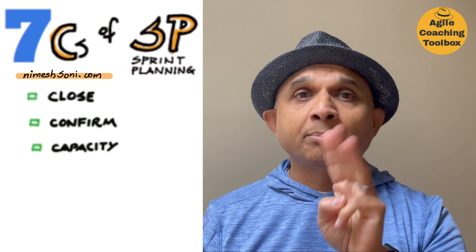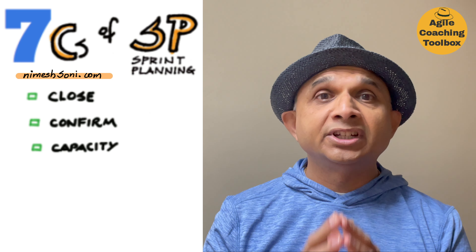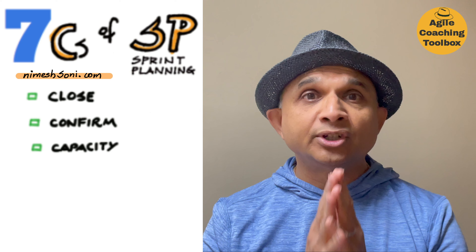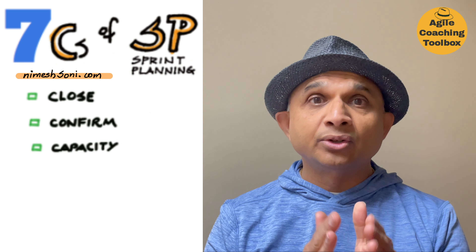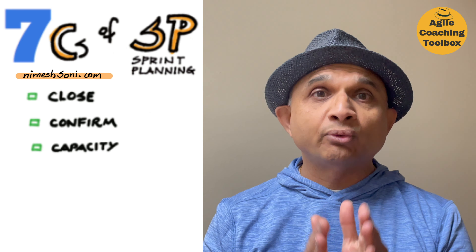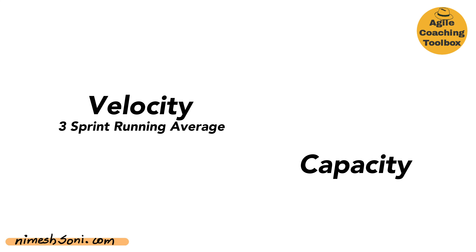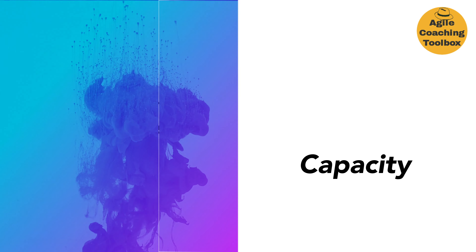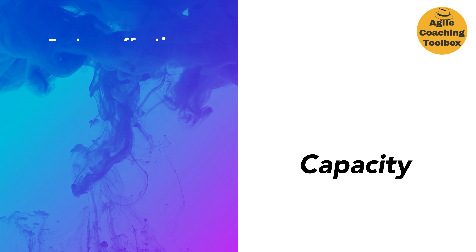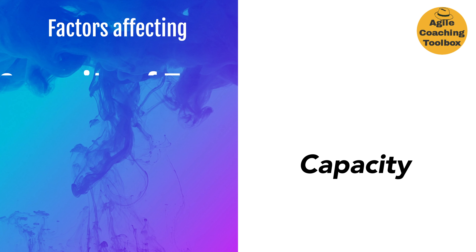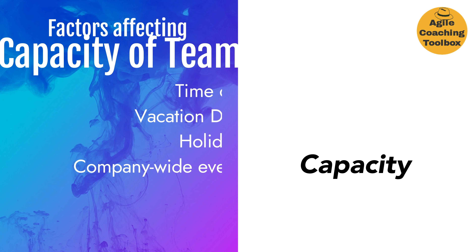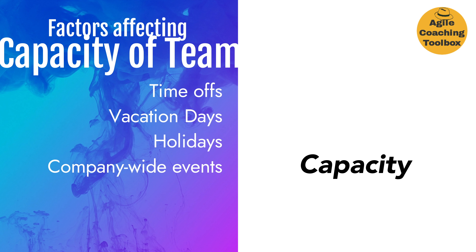Number three is capacity — referring to the capacity of the team. How many stories can you take into the sprint? How many stories should we load into the sprint backlog? To answer this question, you will need to know the velocity of the team and the capacity of the team for this sprint. In order to find out the capacity of your team for this coming sprint, you have to ask them. You have to find out details about their day offs, holidays, planned vacations, any company-wide events — anything and everything that will take time away from the team and have a direct impact on your team's capacity.